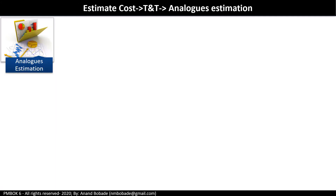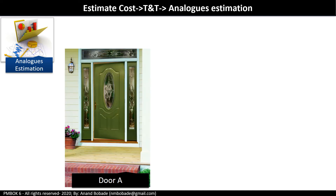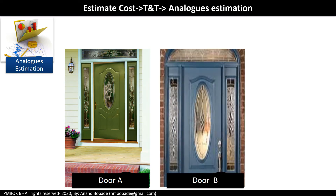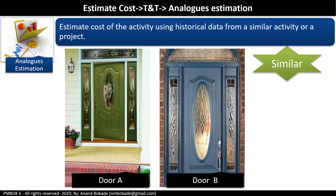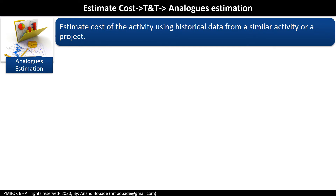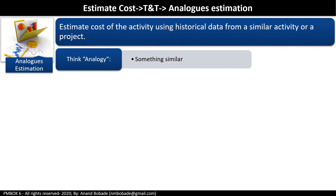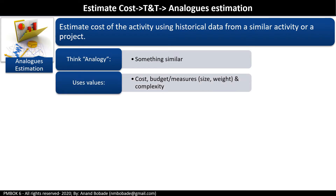Analogous estimation: think of a task to paint a door. A resource who has completed a similar activity in the past is asked to estimate the cost to paint another similar door with a different color. Based on past experience and expert judgment, they will estimate the cost. Through analogous estimation, you estimate the cost of an activity using historical data from a similar activity or project. It uses analogy — something similar — and is applicable to values like cost and budget, or measurements like size, weight, and complexity.